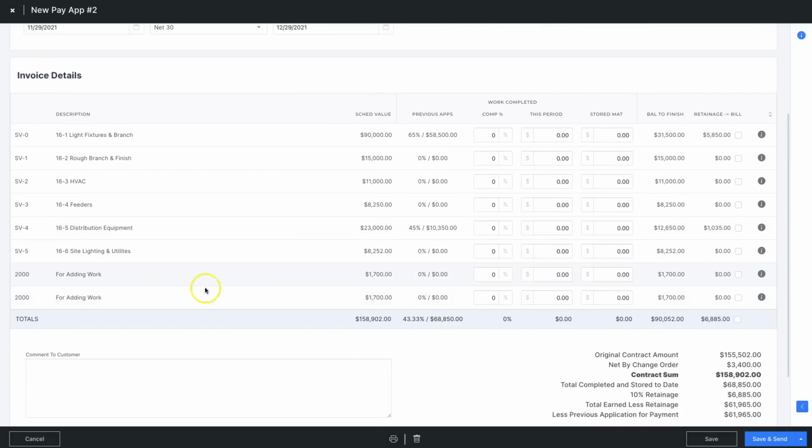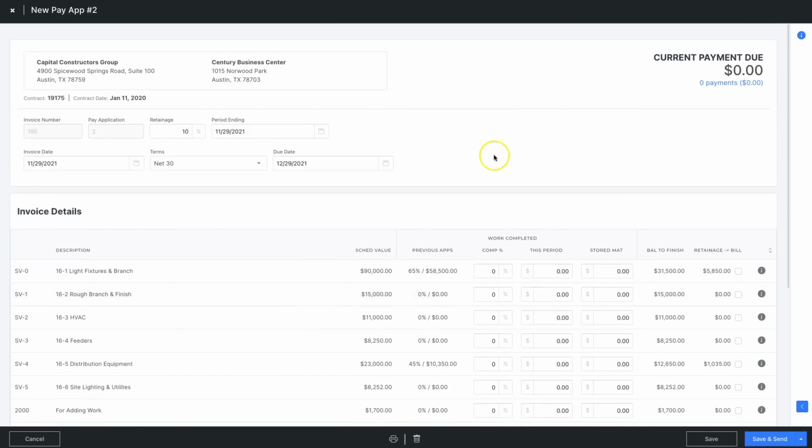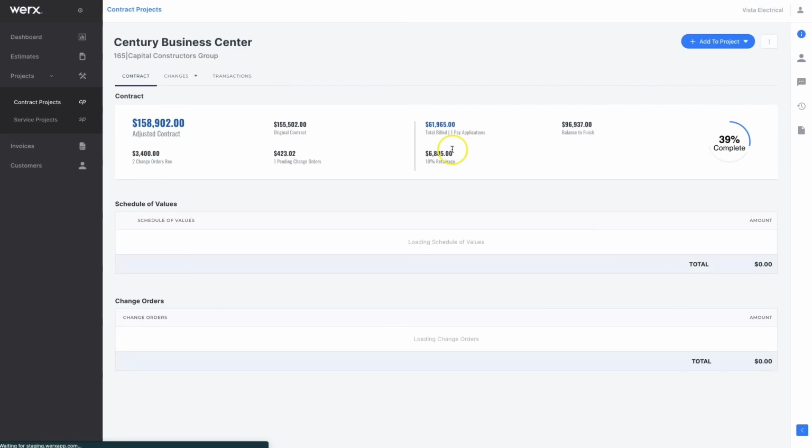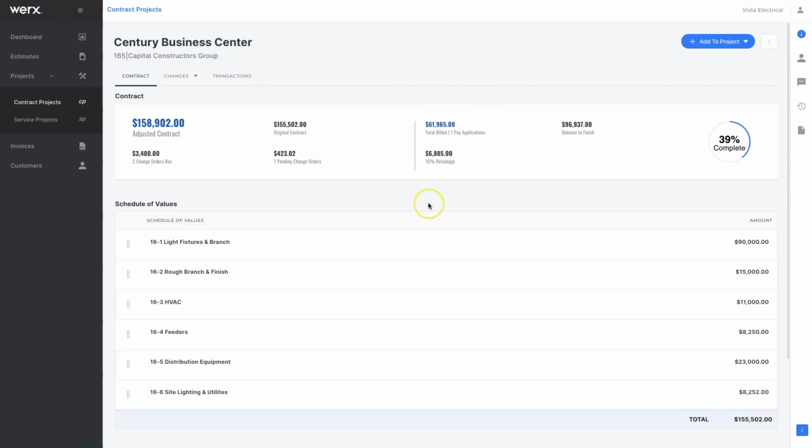So that's the goal, a change order process from the guy in the field to the guy in the office, adding numbers to it and sending that off for approval to the client, approving it, and that getting automatically put onto the schedule of values for billing here. A little complex, but totally worth it in the end.